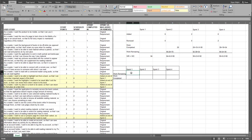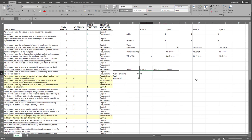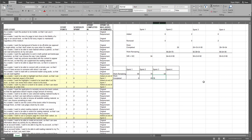We will put here the data from this table. For sprint one, work remaining is 84 and work completed is zero. For sprint two, we have 70 work remaining and work completed 20. For sprint three, we have 54 work remaining and 38 work completed. And for sprint four, we have 36 work remaining and 54 work completed.